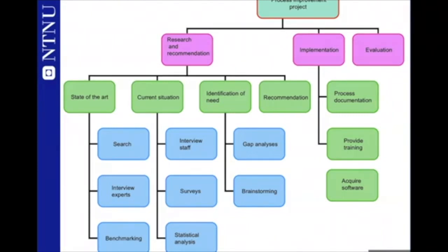We don't need to break these activities down into more and more smaller activities, because interviewing staff is a clear deliverable. I will interview X number of people in my organization to understand their experiences. And the result of this task is clear: a list of experiences, findings, how they experience the existing process. And surveys, it is a clear task with a clear objective, with a clear result. At the end, I will find a list with findings. And statistical analysis is also a clear task with a clear outcome.